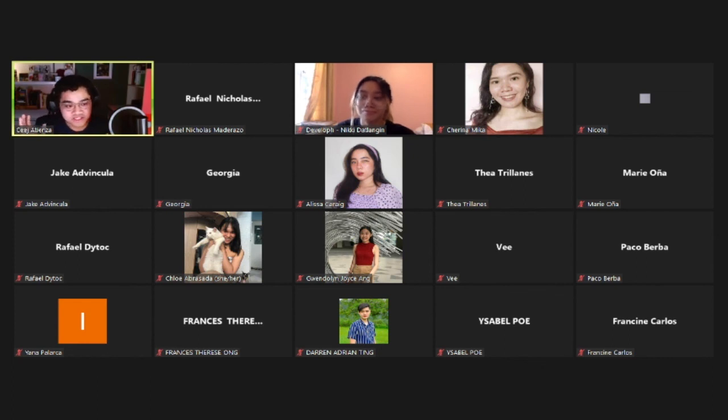Then you also provide examples. For example, with one, it's possibly just a change in font size. With two, it might be a straightforward design fix. With five, you might need to do a bit more research and coordinate with more stakeholders. There are different guides out there. GitLab is a personal favorite. They have their own guide with story point estimation, so you could use that. Basically, just make sure you have a guide if you're getting lost with estimating.